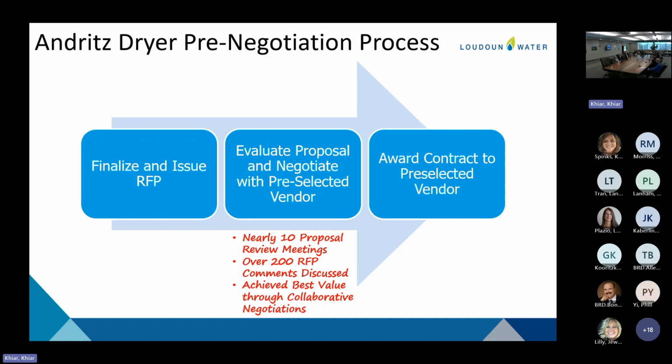And they also have maybe 1 or 2 installations here in the US. So you run into situations like talking about spare parts. When we're all using Andritz, Andritz has a huge warehouse of spare parts for us. When it's 1 installation in the US and they're in Europe, you wait for your spare parts to come on a boat when you need them. So that evaluation was done early. There's no direct competitor, but we did look at all dryer options to make this selection. So there was that down select process. I understand. Okay, thank you.